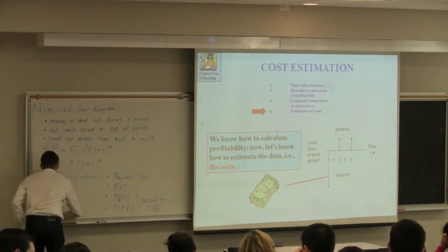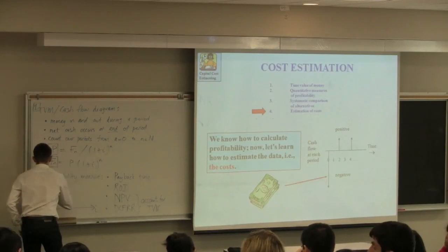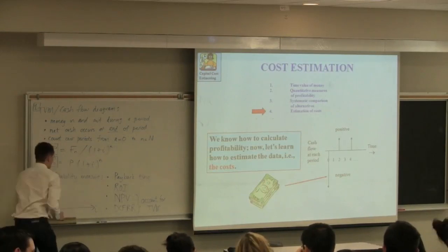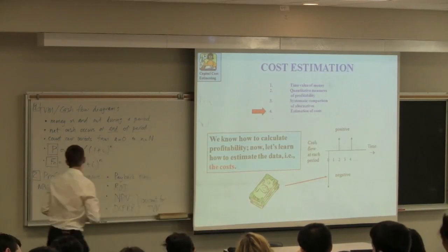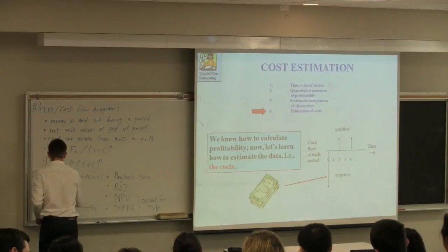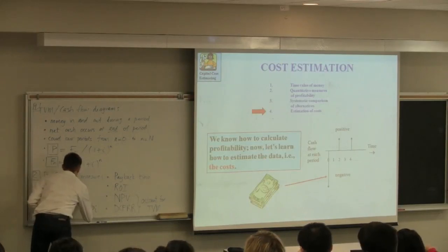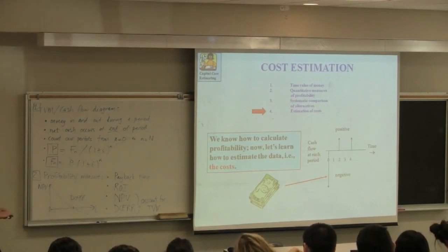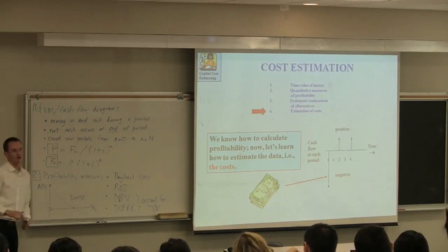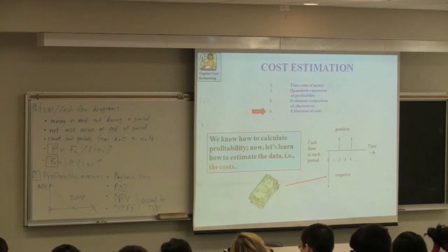If I plot NPV versus interest rate I, this is the expected form of NPV versus I. At some point it will cross the zero mark, which we call the DCFRR. So DCFRR is really just one point on the plot of NPV versus I. I would argue that the NPV versus I curve is often more informative, and also really helpful is plotting NPV versus time.